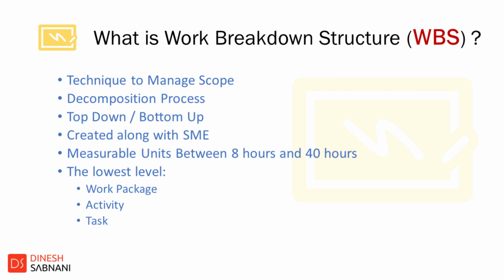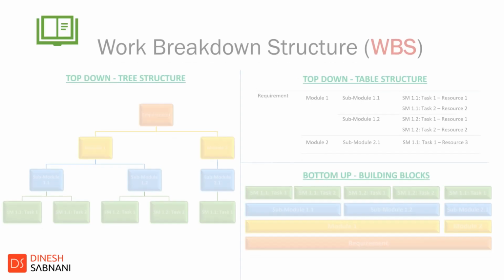In both the cases, the WBS is created with the help of subject matter experts in the project. The lowest level component in WBS is called the work package, activity or a task. Or you can even have a work package further broken down into activities or tasks. The granularity of WBS is decided based on the length and the complexity of the project. Let's see how the WBS will look.